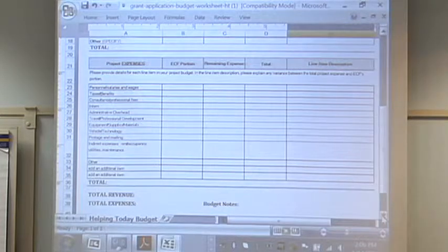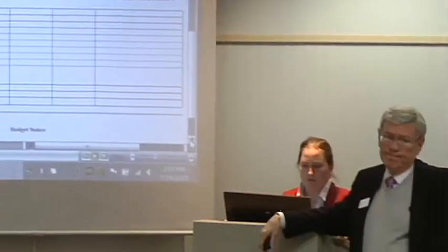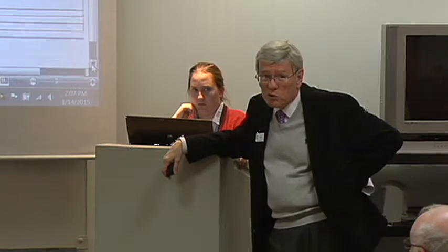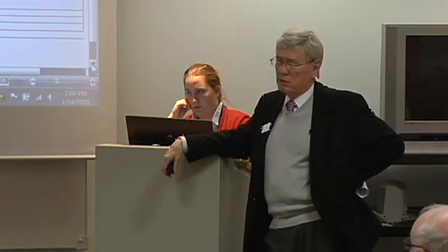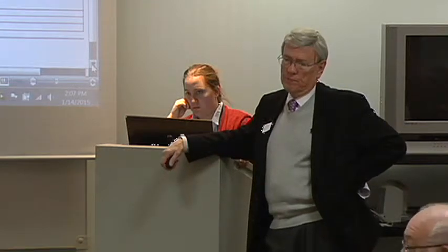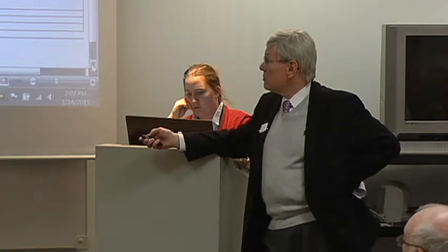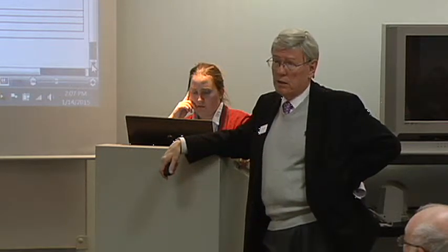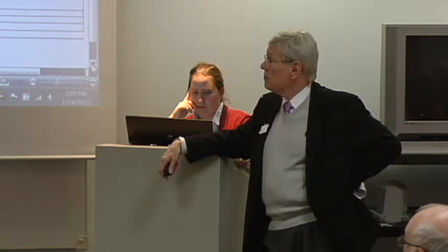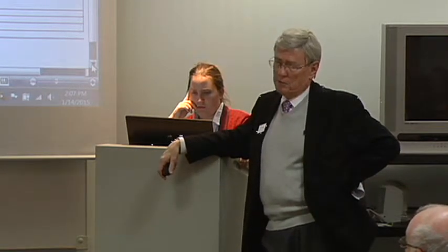Yes, ma'am. Speaking of the overhead, do you have a cap on that? What do you cap? 20%. That's a rough thing. If you came in with 22 or 23, I don't think anybody's going to scream at you. But we try to get it around that. Right, yes, ma'am. Do you use the average 25% for fringe? Well, that would be the administrative overhead you're talking about? No, I'm talking about personnel wages, tax and fringe, I mean, benefits. Oh, benefits? Yeah, that'd be about right.